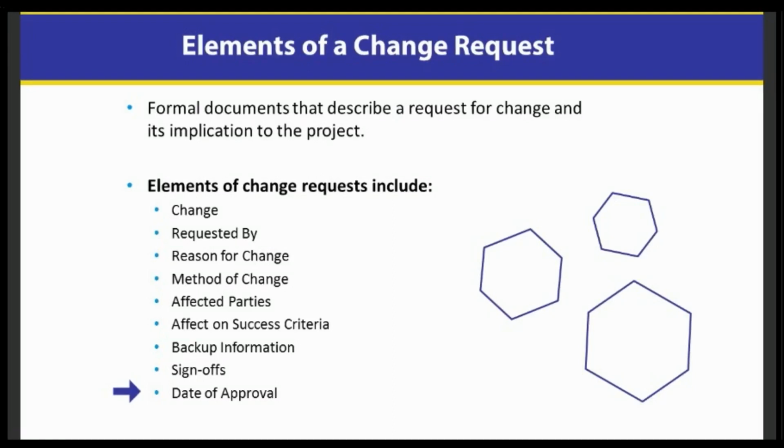Typically all of this would go in maybe a spreadsheet or some sort of database where we could keep up with what we approved and what we didn't approve, and maybe even why. Maybe somebody came up with a great idea. We just don't have the manpower to do it at this point in time. So we will say that we didn't approve it, but this would be a great idea for a future version upgrade or a future ancillary project. So we might have some additional information associated with date of approval or declining and saying we're not going to do that particular activity.